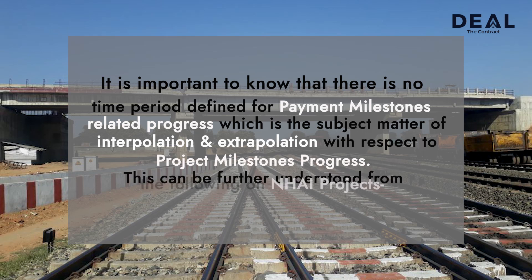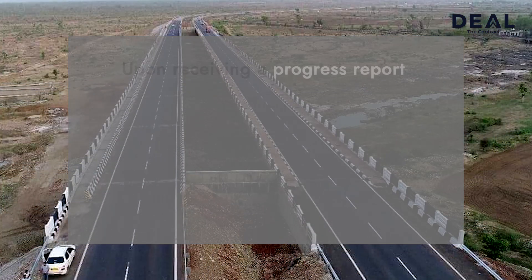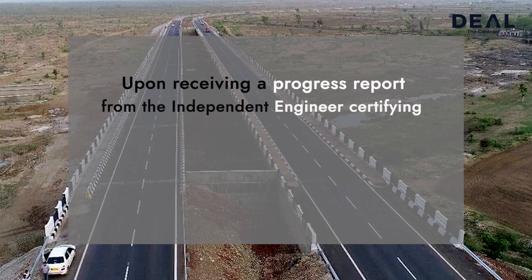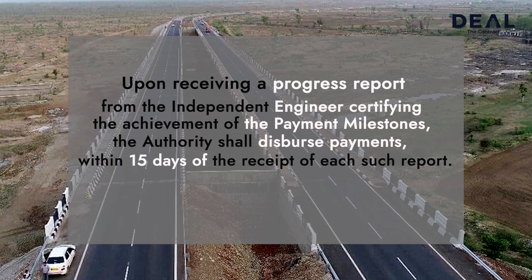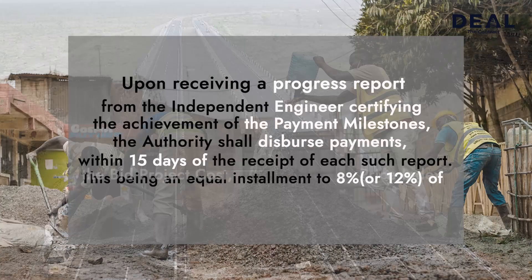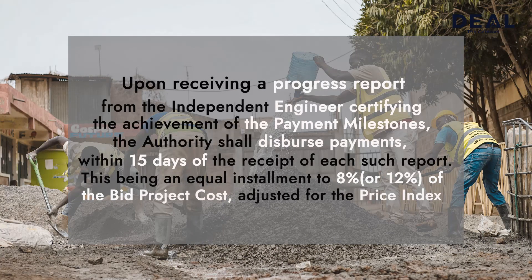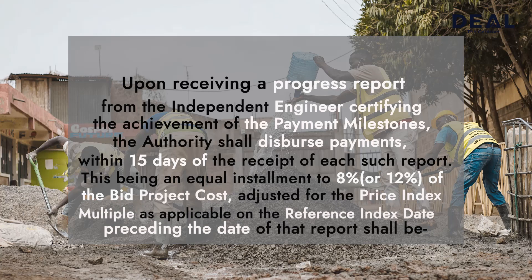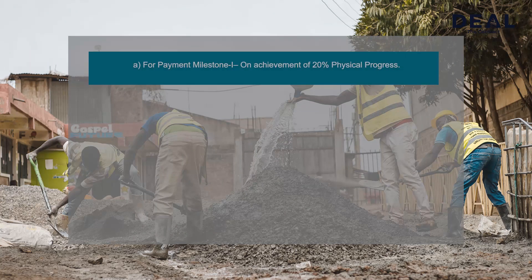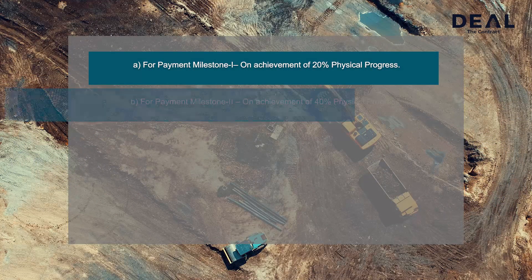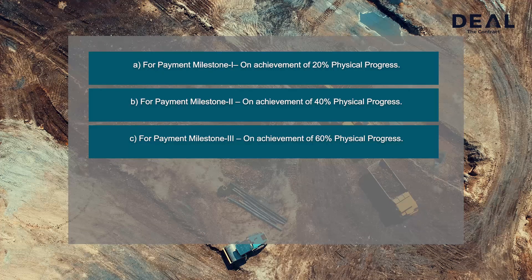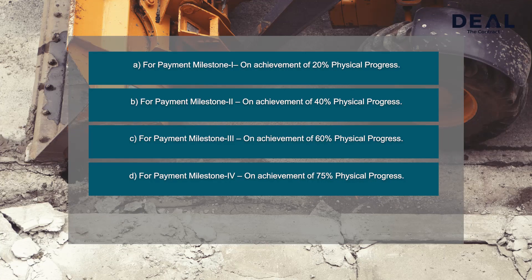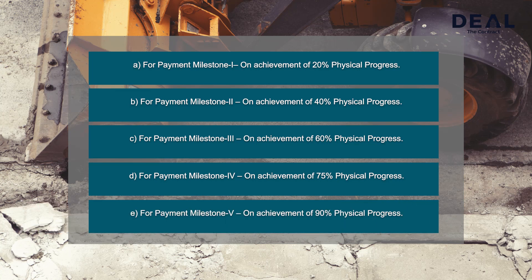On an NHI project, upon receiving a progress report from the independent engineer certifying achievement of the payment milestones, the authority shall disperse payments within 15 days of receipt of each report. This is an equal installment of 8% of the bid budget cost, adjusted for the price index multiple as applicable on the reference index date preceding the date of the report. Payment Milestone 1 is on achievement of 20% physical progress; Milestone 2 at 40%; Milestone 3 at 60%; Milestone 4 at 75%; and Milestone 5 at 90% of physical progress.